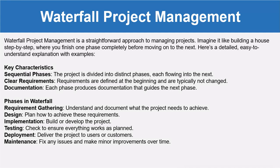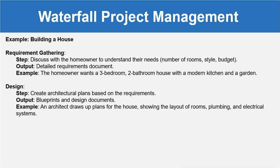Let's take an example of building a house. The first phase is requirement gathering — we discuss with the homeowner to understand their needs: how many rooms are required, what style, budget, etc. The output is a detailed requirement document. For example, the homeowner wants a three-bedroom, two-bathroom house with a modern kitchen and a garden. Then the design phase comes, where we create architectural plans based on the requirements. The output is a blueprint and a functional specification document — for example, an architect draws plans showing the layout of rooms, plumbing, and electrical systems.